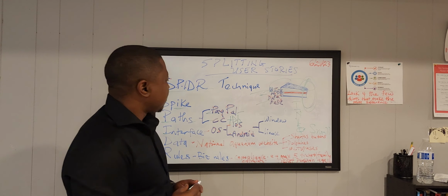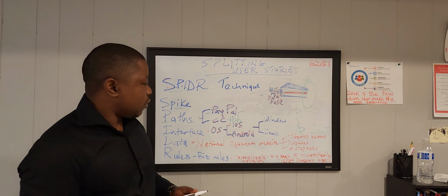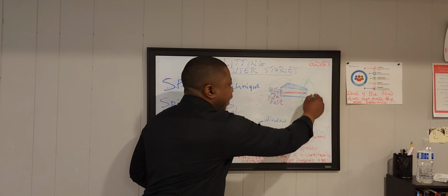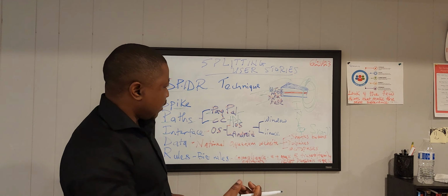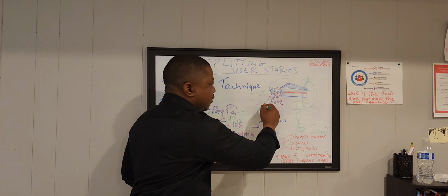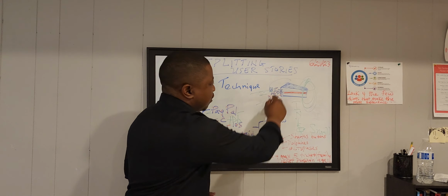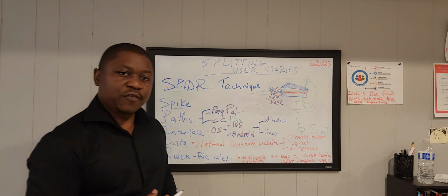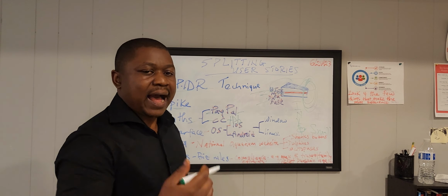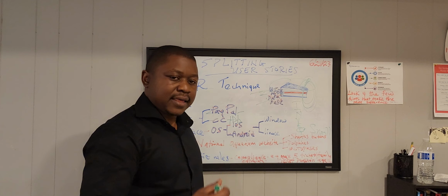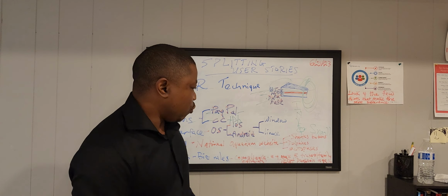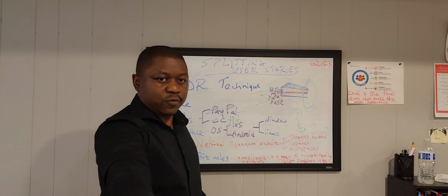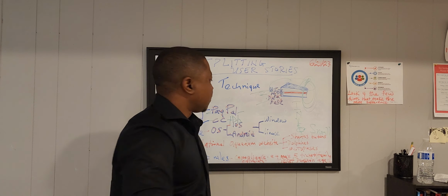So make sure that however you're working with engineers to split the user stories, it should cover all the ingredients of a complete functionality. We should have the user interface, the middle tier of the services, and it should also have the database. So in this video, you have learned about how you can go about splitting a user story to remain small, such that it can be completed within a few days, 1, 2, or 3 days.